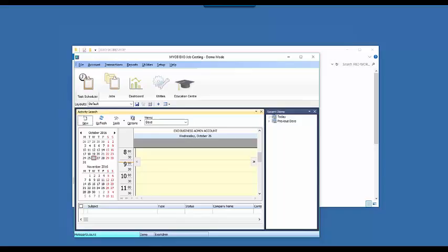And jobs allow flexible invoicing, so you can invoice time and materials, so do the job, invoice it out, per a quote, via a billing schedule, so if you've got staged invoicing that you do, or via asset creation. Billing schedules allow for progress claims and pro forma invoices. It has a stock location called Work in Progress, or WIP, which I will go into a little bit more, which is tracked. And the WIP is automatically now integrated into the general ledger. So older versions of EXO, this wasn't part of EXO, but it is very much now in the current versions.